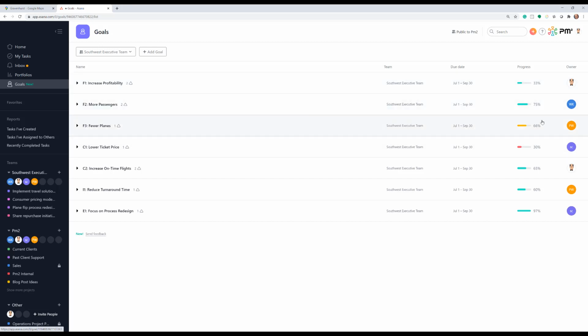Here, I'm at 66% complete, but I've given it a yellow. I'm behind where I expected to be. So that illustrates the 2 different measures. One, the number of units or progress made against plan. And secondly, as a leader, how I assess that in terms of the strategic impact on the business. So again, 33% green. Here's a case where I'm 30%, but red, send help. I need some support. So the idea is now quickly I can see the overall performance of the organization.